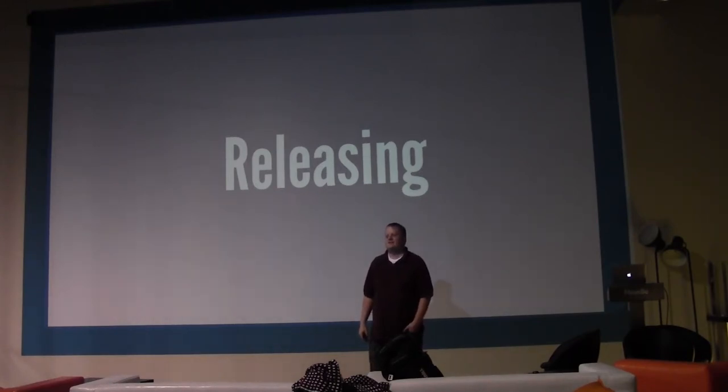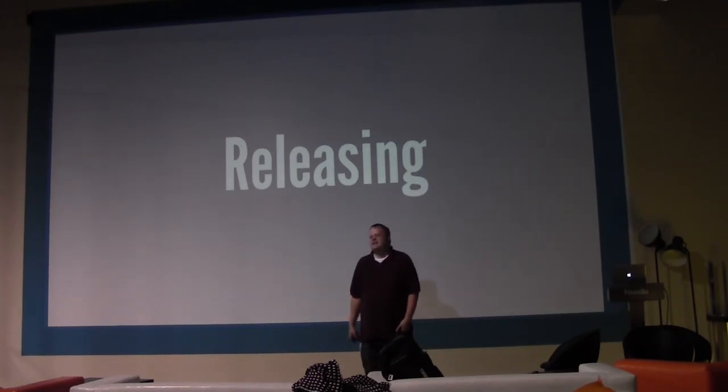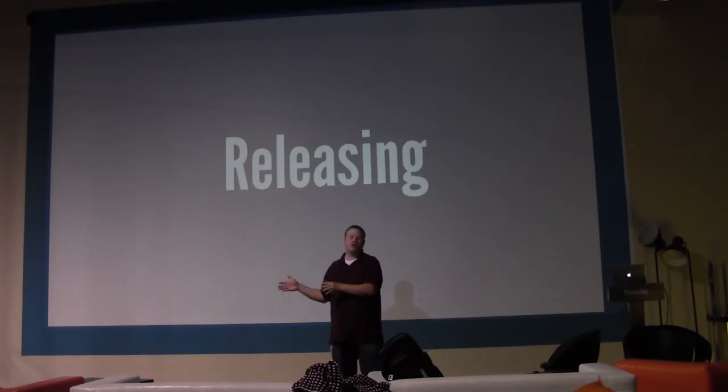Did you as a team agree, okay, something's a couple of hours, we're making it a 2? Kind of, it's kind of this unofficial thing. And what's interesting is we were on one project, and we had kind of a small, medium, large, extra large feeling. Then we moved to a different project, and the time for a 2 was vastly different because it was a much newer project, much younger code base, and so things just took a lot longer because there was so much that we had to do.